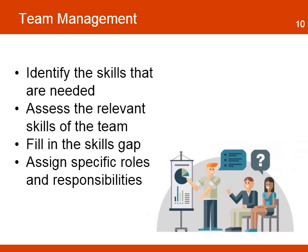Another important project management plan is the team management plan. This plan is exclusively used by the project manager to develop the team and build their skills to respond to the needs of the project. In the plan, the project manager will identify all the tasks and the type of skills that are needed in order to accomplish those activities. The project manager will assess the skills of the project team — whether the team has the skills, knowledge, and experience to do the job. This information is useful in order to assign specific roles and responsibilities for everyone in the team. If the skills are not present, the project manager will develop a plan to fill the gap skills.